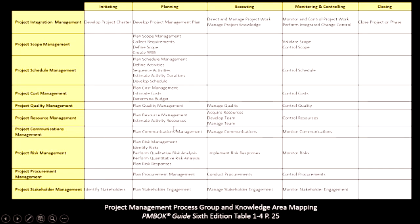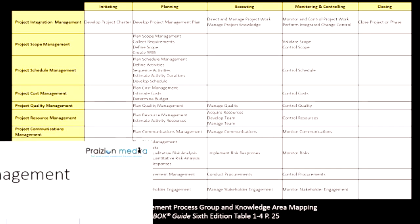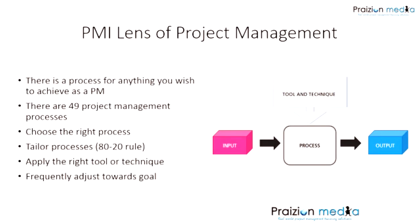What I'd like to do really quickly is take you through a few of these and give you an idea of what exactly the project manager is aspiring to do in these. I'll also call your attention to the fact that every one of those 49 processes has an input — something that goes into the process — a tool and technique to work the process, and an output — something that comes out on the other end.